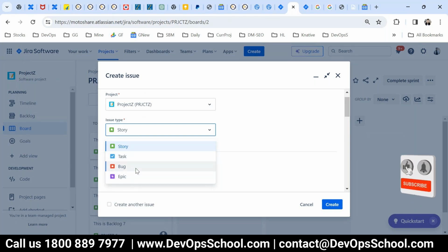So for these types, can't we create separate workflows? No. See, understand it this way. Workflows will be at the project level. So you cannot have a Scrum inside a Kanban. You cannot have a Kanban inside a normal project for development or bug fixing. So when you have this kind of workflow change, keep it in different projects.